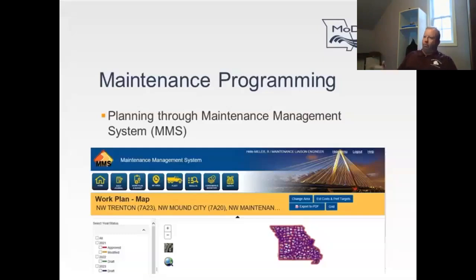So essentially the budget or the org that you would have used to purchase the sealant material, which you will not be doing now because your equipment is broken down and it's projected to be broken down all season long. You essentially would perform a budget transfer from that org to CPX or contractor payments, or essentially the STIP org, of a certain amount, let's say $100,000. And essentially that budget transfer would be the documentation to provide funding from other sources in the STIP. So essentially the STIP's programming balances aren't impacted by this project.